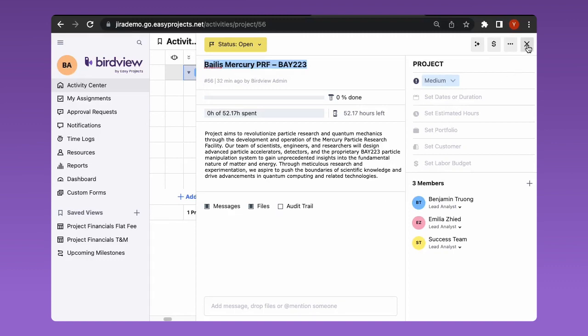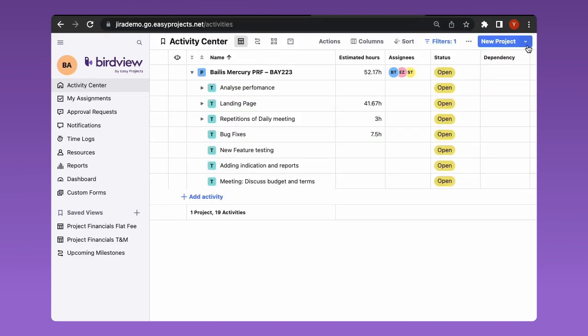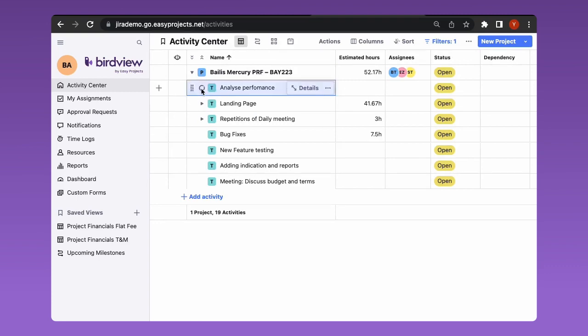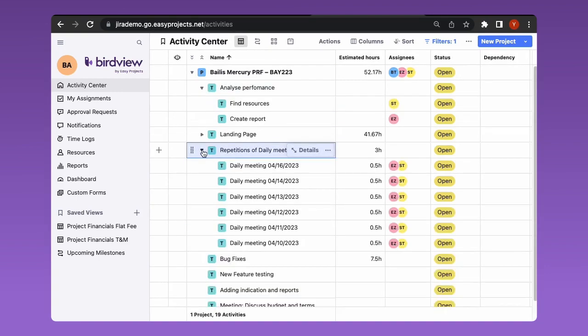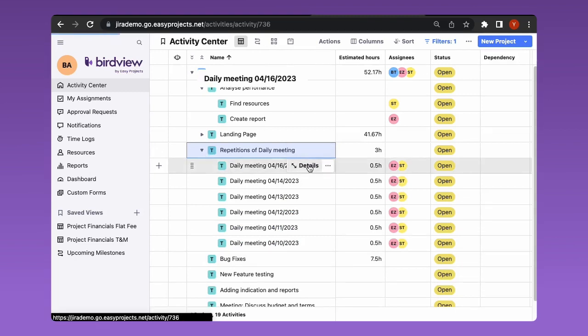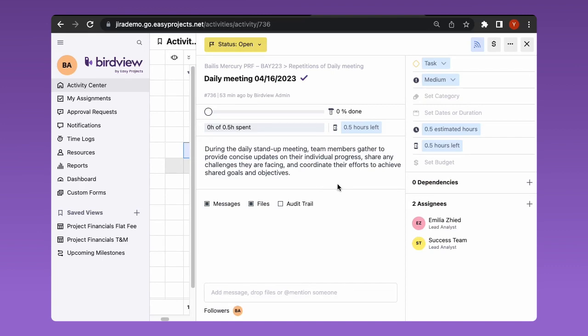The integration allows you migrating the entire JIRA project hierarchy. Epics automatically become project subtasks in BirdView PSA and issues turn into their subtasks. The synchronized data will include the project name, task description, estimation of hours, hours left, and assignees.